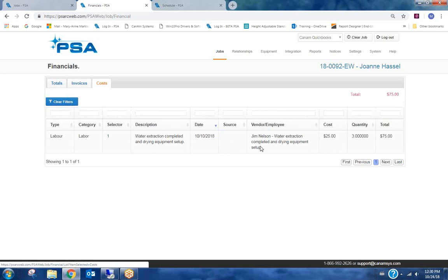With the time card, again, good practice is there is a note field when each person is clocking out of a job, having them trained to put in a little note of what they actually did as far as the work on that particular task comes through and is visible in here as well as on the actual cost report. So that's good information to know exactly what was happening in addition to seeing that there was 3 hours spent on the job. Okay. So that information has flowed through here.